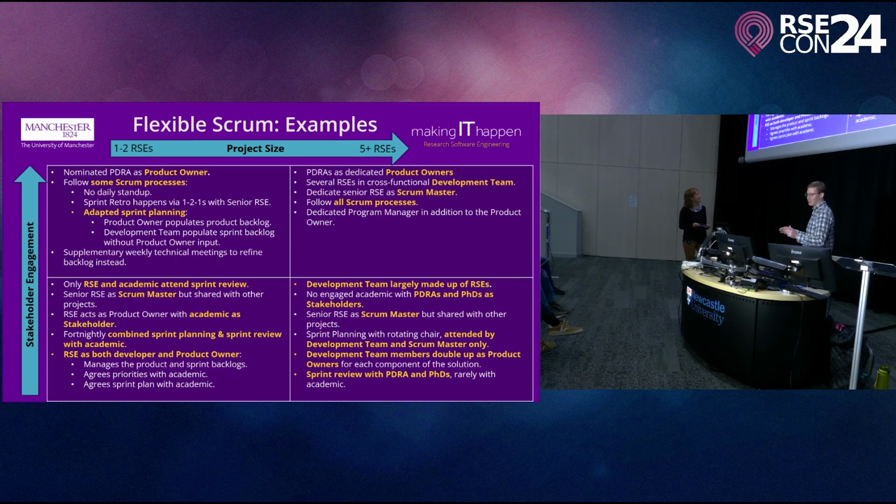Okay, it's a question of it is an overhead, and you've got to kind of decide how you cut your cloth. So I think when you get to quite large projects and you've possibly got high involvement, then you will consider doing the full Scrum process. So you would do a retro as a team. If you get to a stage where the project's only small or your sprints are quite long, then sometimes it's not necessary. You're getting the feedback through other mechanisms. I think if we were detecting that people were not being engaged in an appropriate way, we can adapt that and do retros in a different way.